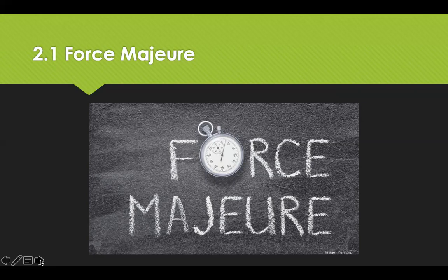But nonetheless, a force majeure clause should include a statement of the events that will constitute force majeure, obligating either party to notify the other if a force majeure event has occurred. It states that a party will not be considered in default of its contractual obligations if it can show that full performance was prevented by the force majeure event. And it provides for the contract to be suspended for up to 30 days. And then it provides for termination of the contract by mutual consent if the force majeure event continues to prevent performance for more than 30 days.